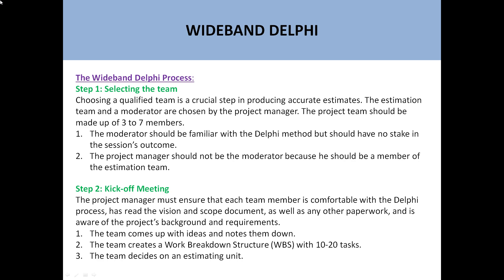The next step is the kickoff meeting. The project manager should ensure that all team members have the vision and scope document and are clear about what they want to achieve and estimate. The team comes up with ideas, notes them down, creates a work breakdown structure with 10 to 20 tasks, and decides on an estimation unit. In the kickoff meeting, you initiate things and start the estimation.